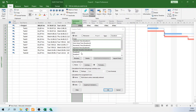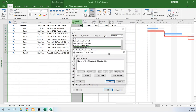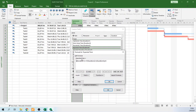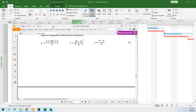In order to define these formulas, select the expected time field from Custom Fields and click the formula button. Our formula is: (A + 4M + B) / 6, where A stands for optimistic time, M stands for most likely time, and B stands for pessimistic time. You can write the duration names directly or select them from the dropdown list.